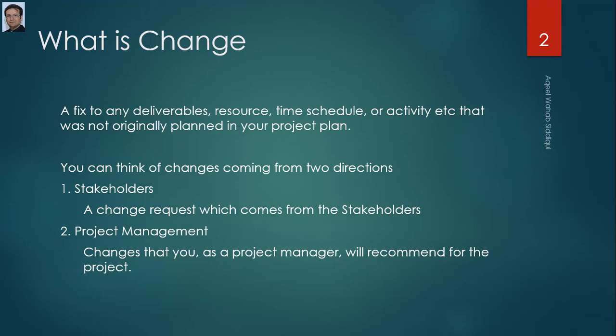You want to distinguish between pitching and catching changes for two reasons. First, you are catching a change because that change is coming from the stakeholder, either in the executing process group or in the planning phase of the project. So your role will be different. You will have a meeting with him or her or any stakeholder, and then you will evaluate that change request, and then the ultimate decision will be shared with that stakeholder. This kind of change is called catching a change.